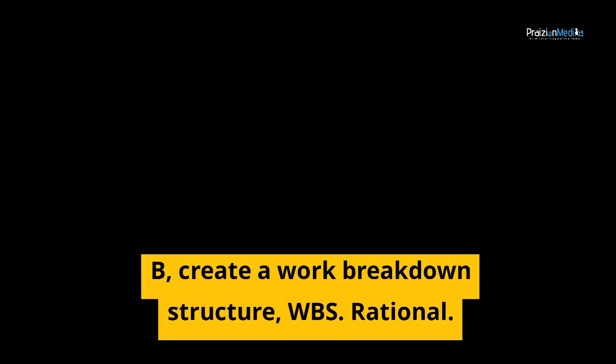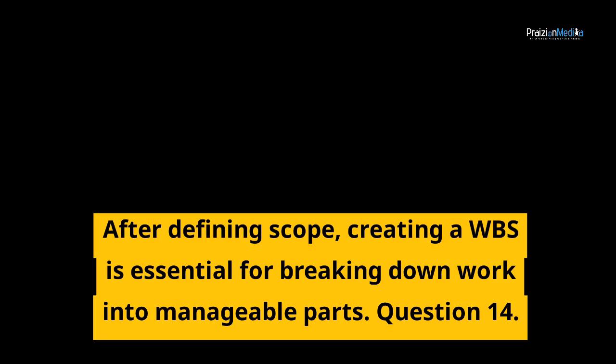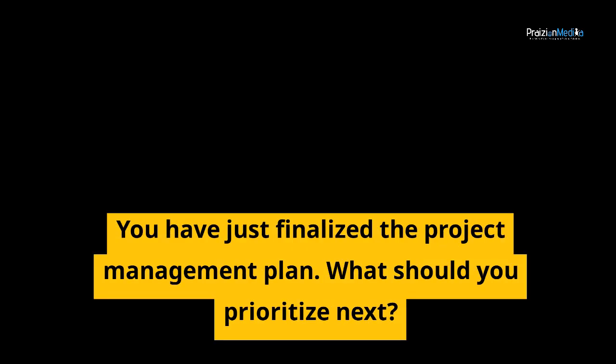Correct answer, B. Create a work breakdown structure, WBS. Rationale. After defining scope, creating a WBS is essential for breaking down work into manageable parts. Question 14. You have just finalized the project management plan. What should you prioritize next?